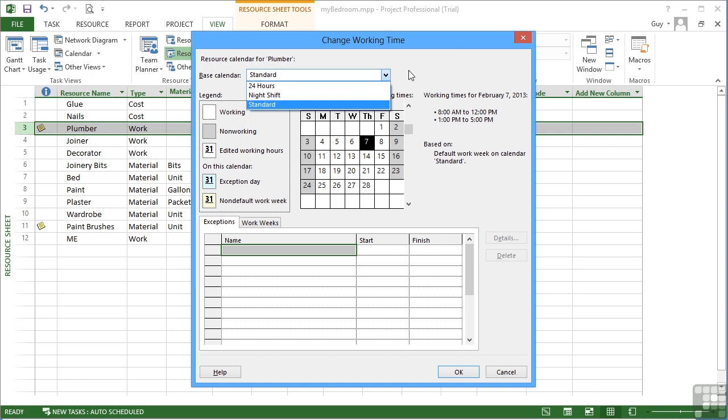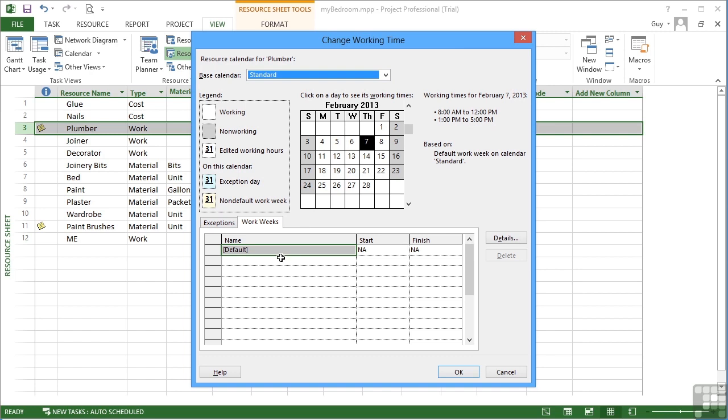However, our plumber is a normal day shift person, so we'll leave him on the standard calendar, but we can adjust the plumber's hours just for the plumber by adjusting his calendar. If we go into the work weeks, this is the calendar for our plumber, the default calendar, and we can break into the details.